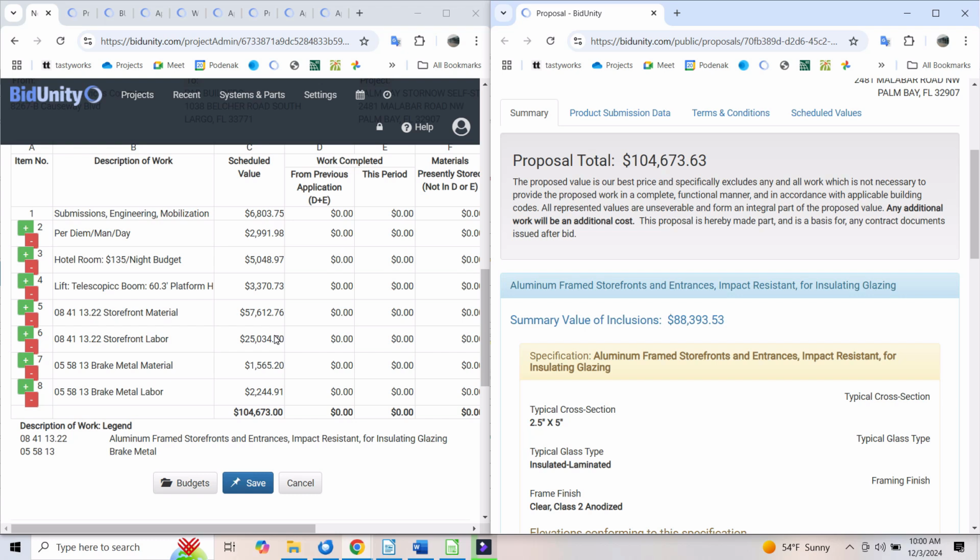So the 20th to the 25th, we're going to be receiving payment for that on average about 60 days later. And so we want to make sure that our cash flow is as good as it can be. If you're laying out money for 2 months, you'd want to recover that money as quickly as you can.